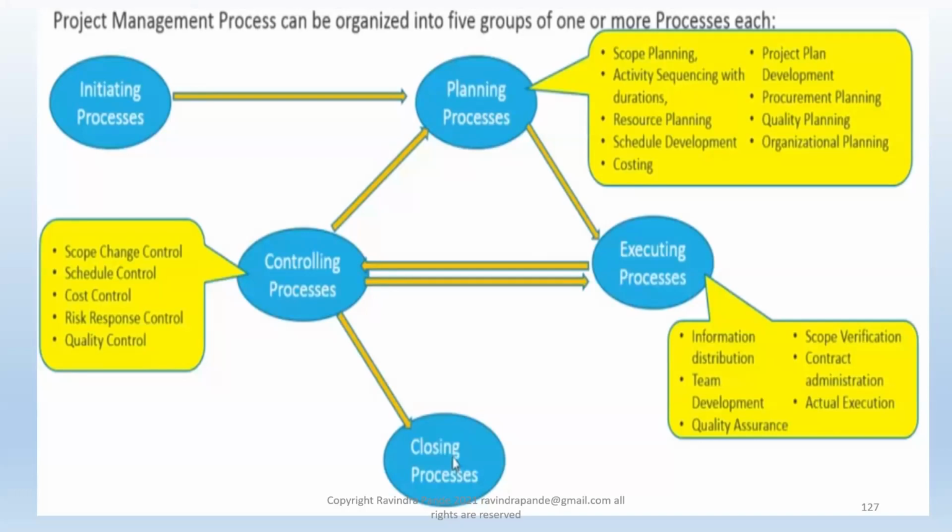In Microsoft Project, you can add asset cost, licensing cost, the raw material cost, as well as the machine procurement cost, as well as human resources cost. So all these things give us an actual project cost for a given hour, for a given day, and so on and so forth. So we keep tracking our project cost against our budget planning, against our plan, and so on and so forth.